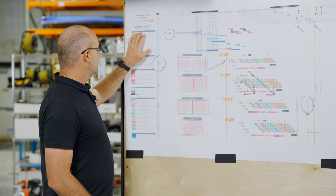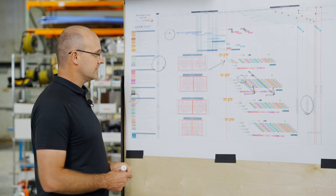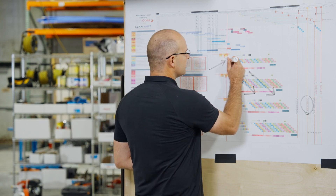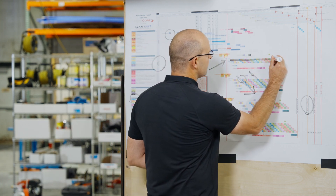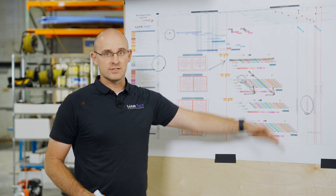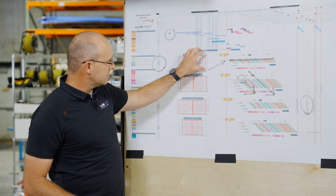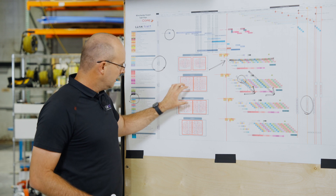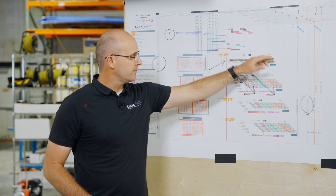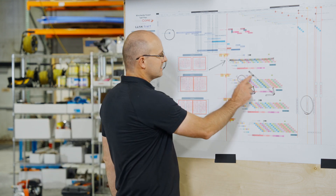You need to be very careful and watch how the tact wagons are packaged. When you look at each one of these zones, from left to right is called a sequence. That sequence repeats on a rhythm and stacks on top of itself because you work by zones — this zone, to this zone, to this zone. This sequence was an original part of your pull plan and it's repeated through the zones, and it protects that trade flow.